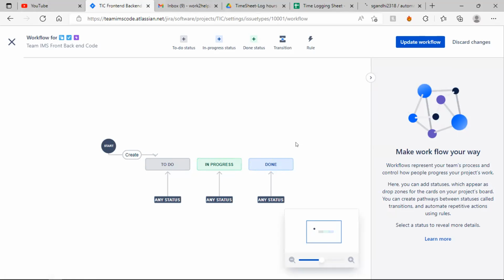Yes, that's correct. Considering the testing team, Kishan and Lokesh who are working right now, it's going to be in the to-do phase, then it's going to be in test, right? Yes, that's correct. And they start testing. When they are done testing, it's going to be in the awaiting field validation, so that we can know, right? Okay, they will assign the ticket to me and Kushalbhai, and that would go in the awaiting validation. When we perfectly check it, it will go to the done phase. Yes, that's correct. So I think that should be the workflow for the testing.